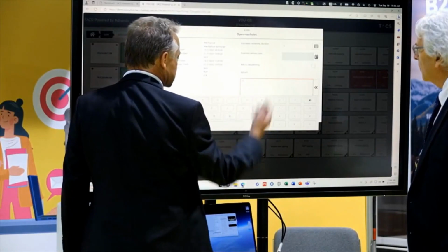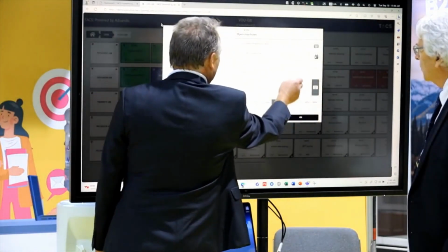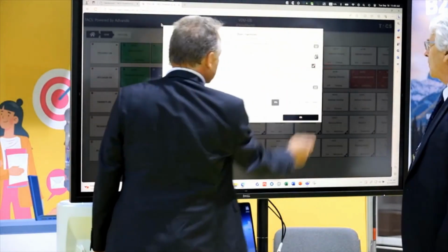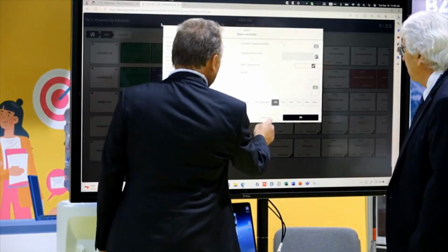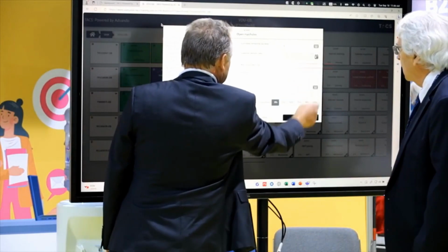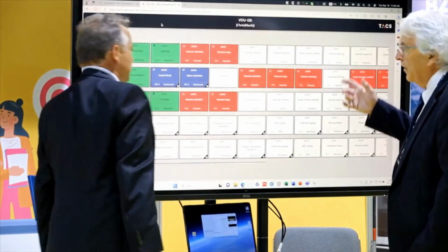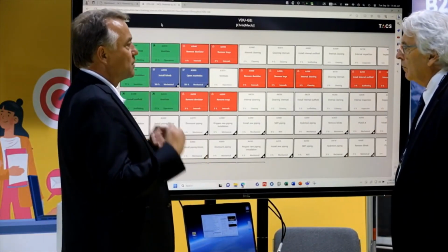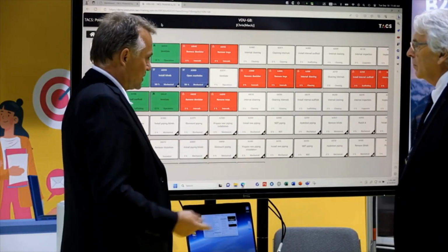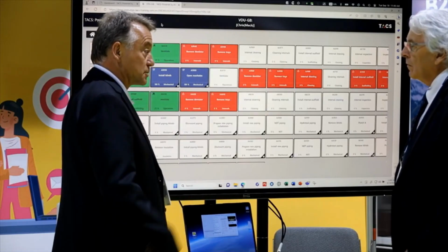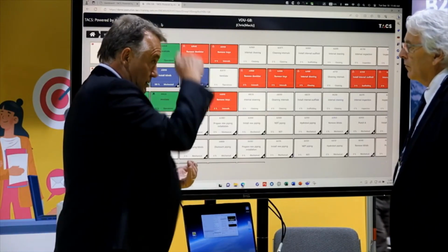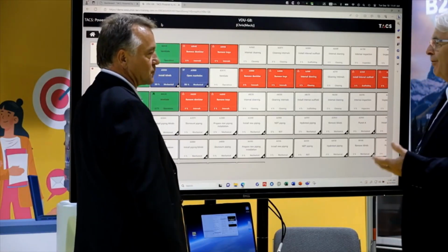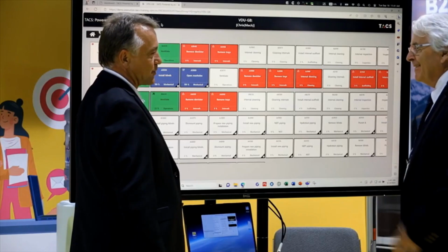Some notes to the scheduler, or you can change the dates. I can add it to the day planning for tomorrow, like a priority permit. So you can tie your permitting right in there, so it's a flag for what has to be permitted. You're dynamically communicating to the ops folks that tomorrow morning this is a priority, so you know you're going to have to permit this work area, rather than discovering it at the end of the day.